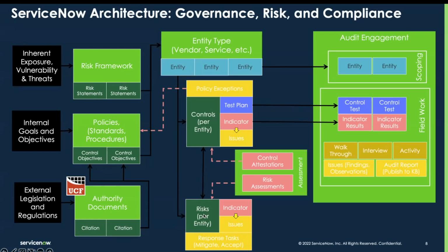Moving down here, with those specific risks, I can continuously monitor that status and outcome, that risk, to see whether or not it has occurred through our indicators. So these indicators are going to act as continuously monitoring devices to determine, did that risk actually happen? Has it come to fruition yet? And from there, let's say that that risk of the pandemic was realized, it can go ahead and kick off an issue. So a quick example of this, let's say that you have a risk that pertains to your website status. So you can have an indicator that monitors your specific website status. Let's say that your website has been down for 3 hours. That indicator can then realize that and fire off an issue and turn that risk from potential into actual, create that risk form so you can go about mitigating that.